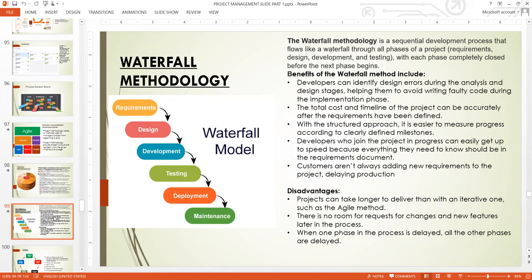In Waterfall, you cannot jump phases. You can't jump from requirements to development — you must finish design first. You can't start development without finishing design. You cannot start testing without totally finishing development. You cannot start deploying without finishing testing, and you cannot start maintenance without fully deploying the whole project.